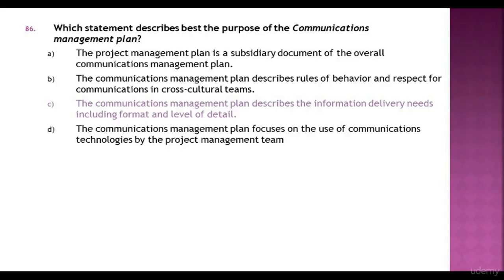Answer C is the correct choice. The communications management plan describes the information delivery needs, including format and level of detail.